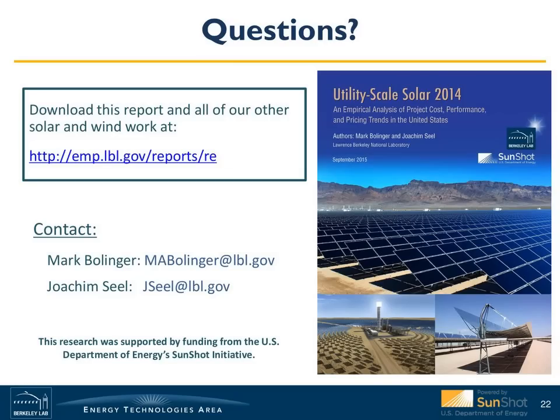One easily answerable question that popped up was whether or not we excluded or subtracted ITC from any cost element in the bottom-up cost modeling exercise. And no, those prices presented there, as well as all the prices that refer to the project prices in the whole price section, do not subtract the ITC in any way. They are all pre-incentive full project costs.